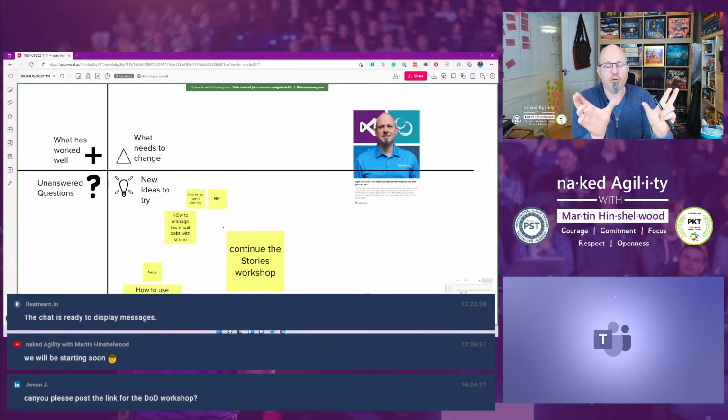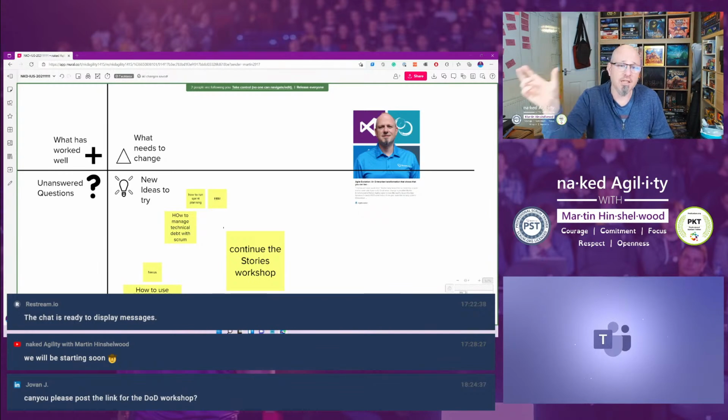The way they do it was they had dedicated members of the team who were the site reliability development engineers. They had some crazy acronym for it. But they effectively had a dual role of delivering from the SRE backlog, so the live site issues backlog, dealing with live site issues so that you protected the team so they could focus on value, and then that rotated through the team so that you didn't have one person annoyed at that. Erica, if you look on my YouTube channel, I think I've got a talk just on that topic from that team. Ah, perfect. Wonderful. Thank you. If I don't, let me know and I can make you one.